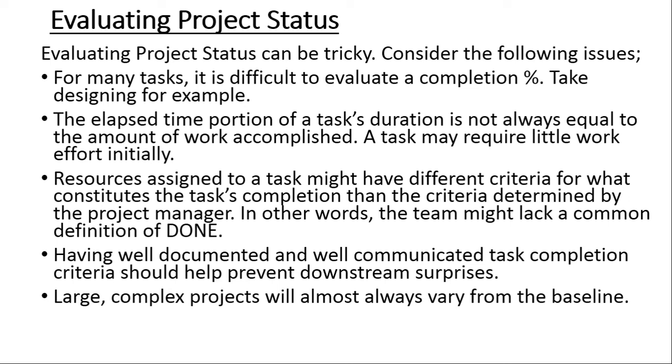Then the time that has elapsed on the task does not necessarily equal the amount of work which has been accomplished. It means that if you have a task that goes on for 5 days, and you finish 1 day, it doesn't necessarily mean you have done 25% of the work, because there are certain tasks that are very light at the beginning, then during the last 2 days it's very heavy because of the nature of the task.